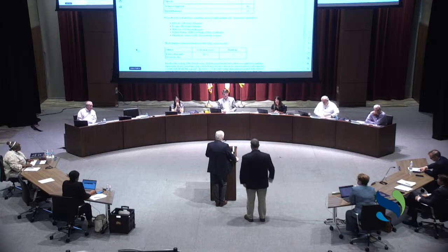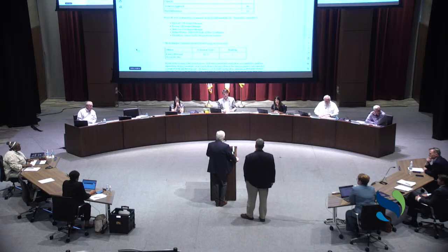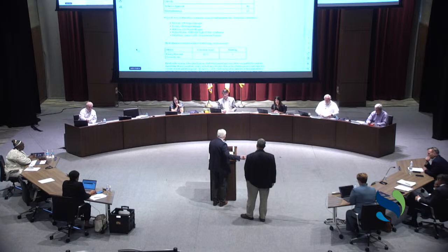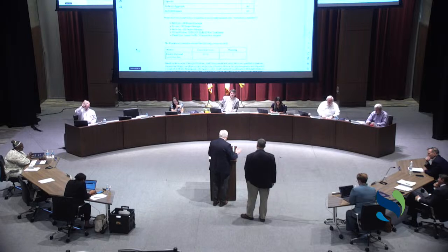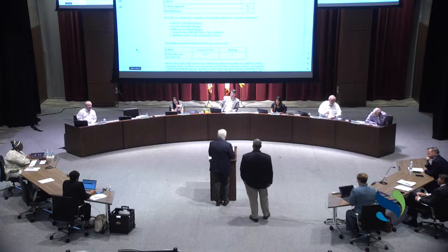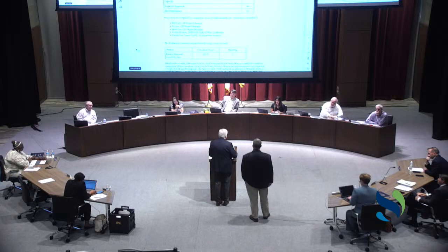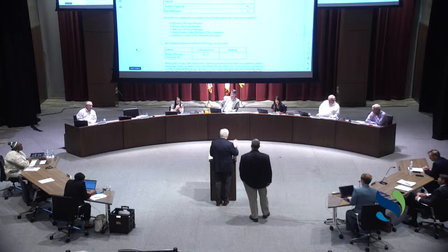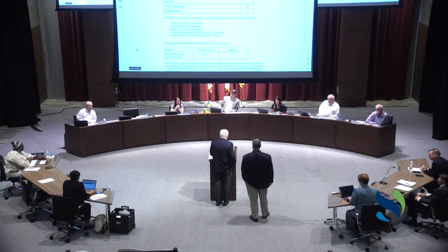First, the scope and complexity of the work doesn't lend itself to the staff we have available currently to perform something like this. So let me brag on Wesley and his team just a moment. He gave me this number earlier today, so I wanted to share it since I've got it here. Out of the some 20 T-SPLOST sidewalk program projects that we have funded in T-SPLOST 2021, as of today, 9 of those 20 projects have been completed. And we began collections in April of 22 for that program. So we're in a good place right now. I commend the efforts of Wesley and the sidewalk design team, with the consultant performed, with project managers providing oversight against an overall program budget of about $10.1 million right now. We just issued notice to proceed for 2 others. So things are progressing very well with the process we have in place with consultant design right now, moving projects forward.